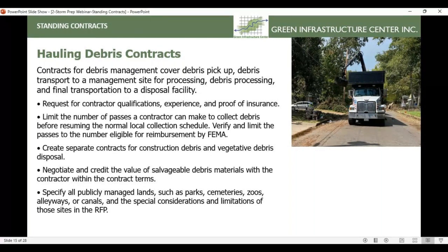The other thing I would recommend, if you have not had a storm, be it a hurricane or an ice storm, is the U.S. Army Corps of Engineers has some pretty accurate debris models that you can run. And I would suggest running a worst case scenario, which would be an early year, slow moving storm. So leaf on. So when the leaves are on the trees, you're obviously going to have a lot more debris. If it's moving slow, you're going to have a lot more debris. And if it's a wet storm, you're going to have more debris because you're going to have more tip overs.